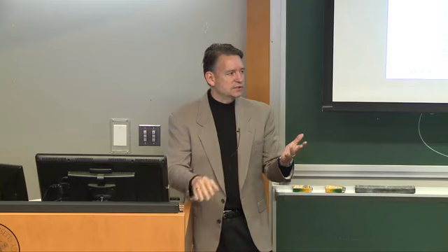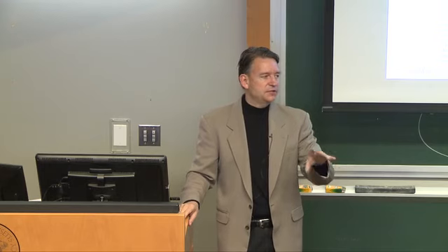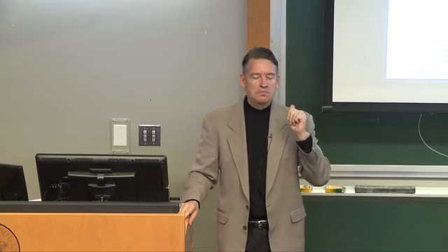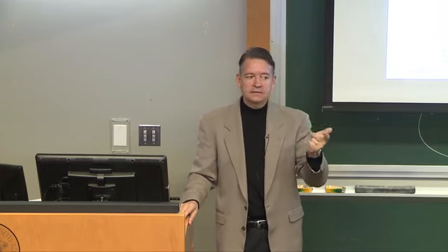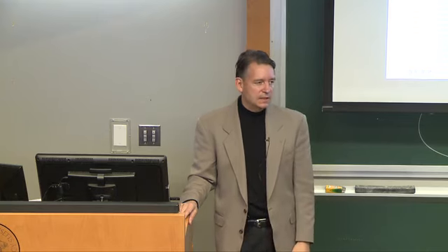Yep, Sam, go ahead. Do you have to have contracts in place already for the manufacturing and operations and things? Absolutely. I mean, basically, green light CDR, the next day you start manufacturing. So, every portion of all the components, all the manufacturing, all of that has been bid, selected, contracted. Everything's in place contractually. Absolutely.